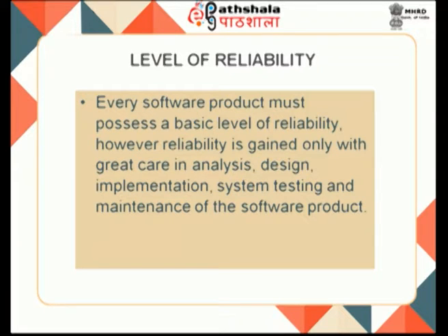Now let us understand an alternative scenario. We act as clients and pose the same problem to a company. In the business of developing software for specific clients, though there is no standard productivity figure and it varies a lot, it is fair to say a productivity figure of 1000 lines of code per person month is quite respectable.